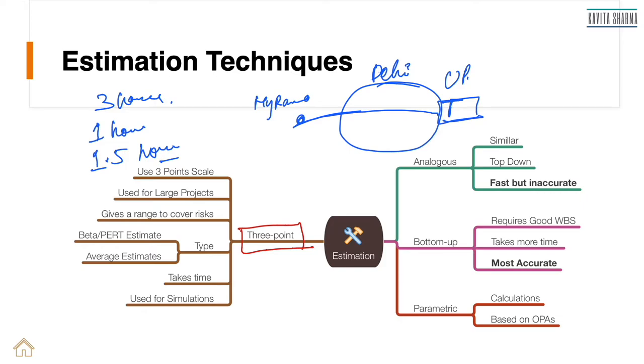So what did I just gave him, I gave him three point estimates. The three hours is a pessimist estimate, when things can go wrong. One hour is optimistic estimate, when everything is falling in place, timely. And 1.5 hours is most likely estimate.